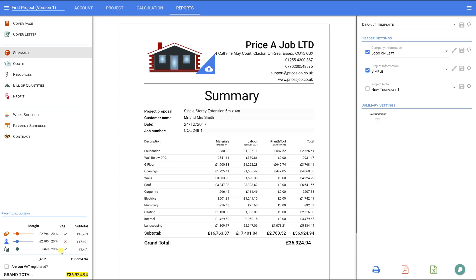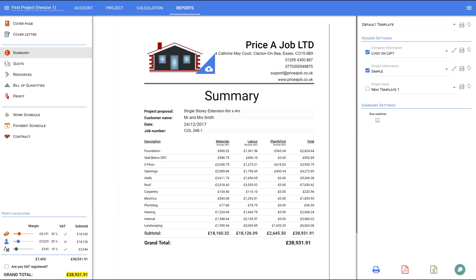I'm going to put a 30% profit for the materials, 25% for the labour, and 15% for plant and tool. As soon as you change your profit margin, the system will automatically recalculate every single price in this project.